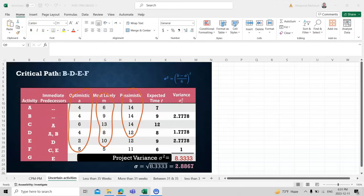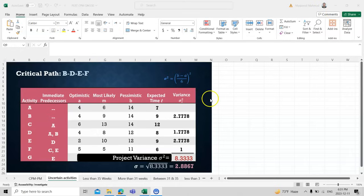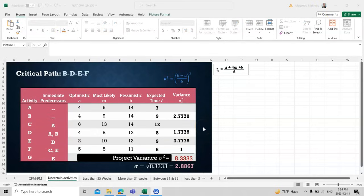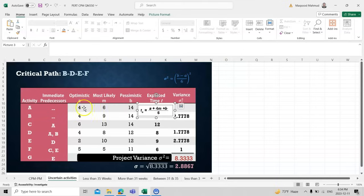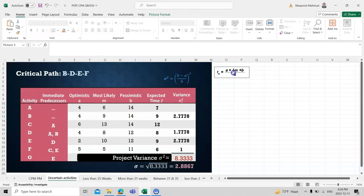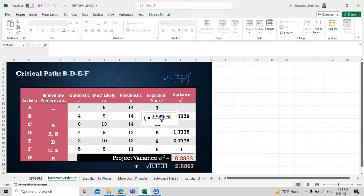We have a formula to find the expected time from these three cases. We represent them as a, m, and b. For example, if a = 4, m = 6, and b = 14, applying the formula gives us an expected time of 7. We apply this same formula for all activities.